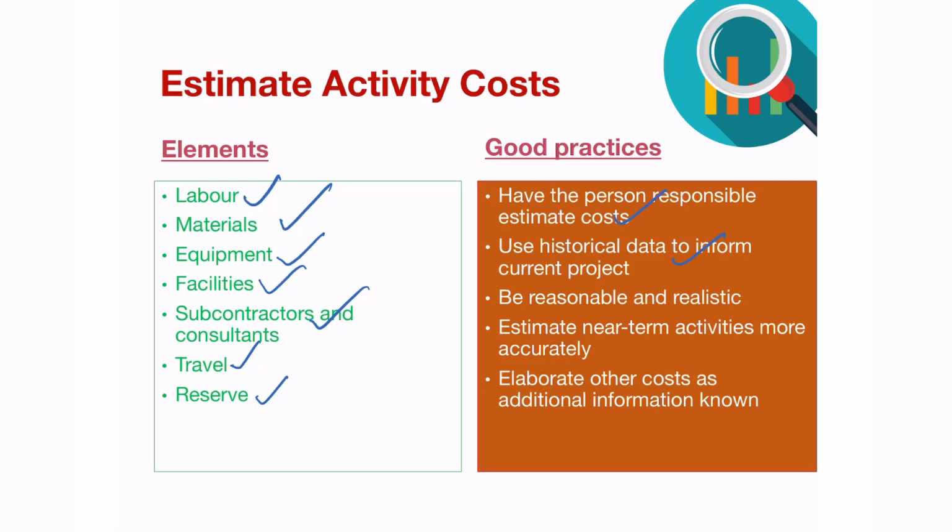When we did the chapter on project closing, we learned that you need to keep careful records of the entire project. This is when you're doing your estimates and when you generate your project budget. That is the time when you pull your historical documents and you start looking at similar projects that you've done before in order to estimate project costs going forward.